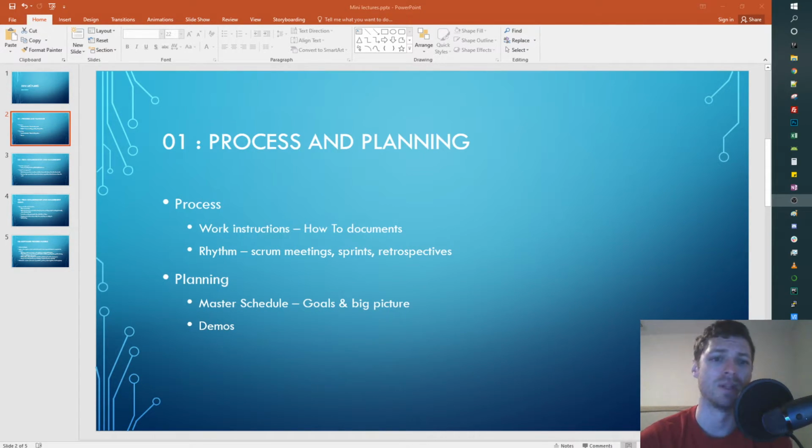I recommend having work instructions in a wiki type format where it can be live edited and people can be pointed to. Something that I spearheaded as part of the TrueCourse project is having a wiki type of page. In many legacy projects that I have seen, they just posted those in the repository, and then people would download them, and once it's downloaded, it's basically out of date. So there was a lot of conflicting information. So I highly recommend having work instructions in that online type of format.